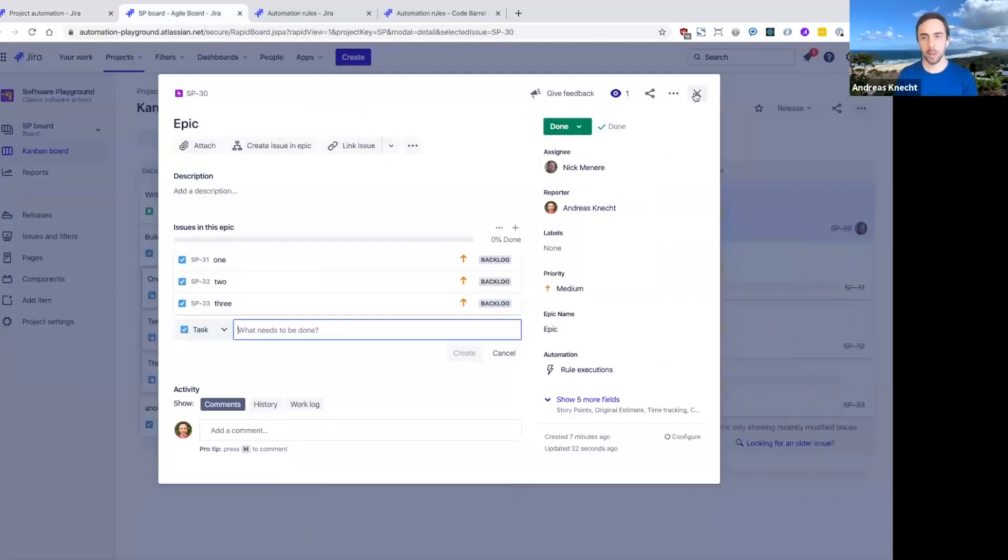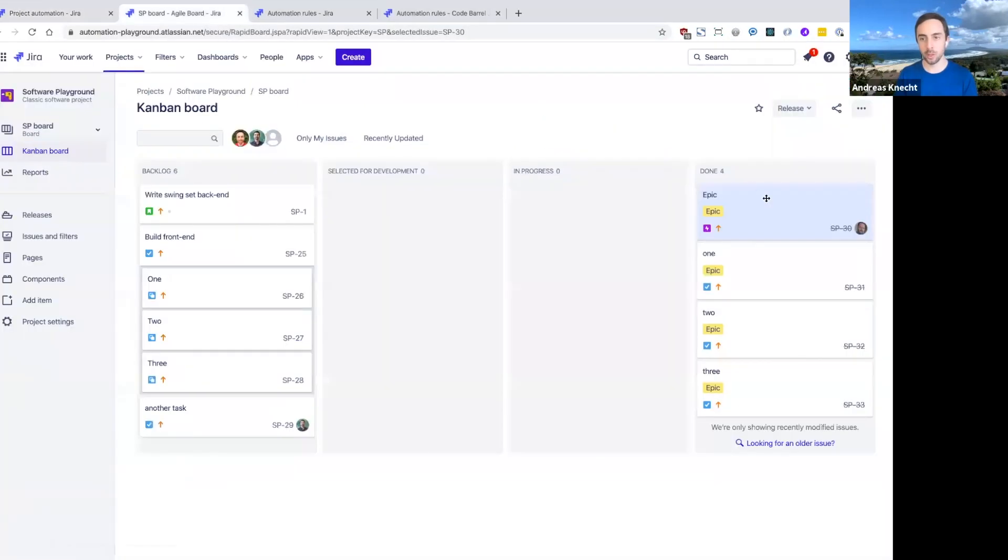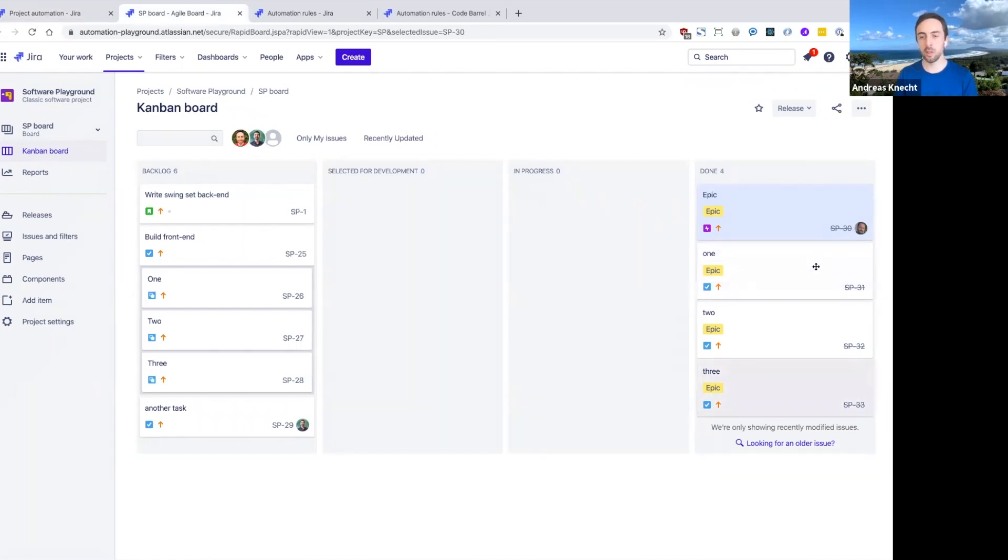If I come back to our board here, you can see that not just the epic's been moved to done now, but also the three stories that I just created have been automatically moved across to done by this automation rule.